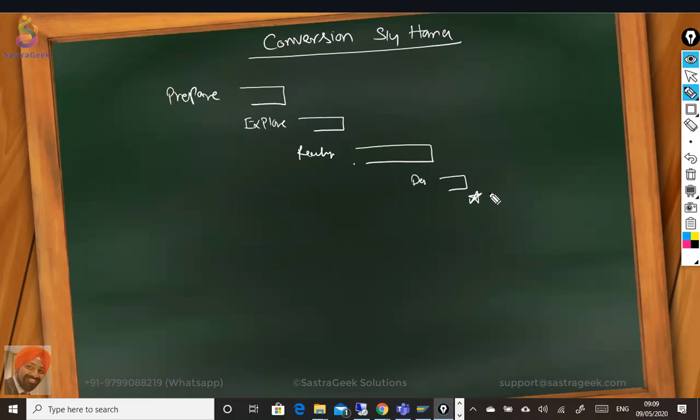Conversion itself is the minimum chunk which needs to happen. Here you can divide into sprints: your first development system conversion, quality system conversion, and in the deployment, your production system conversion would happen.